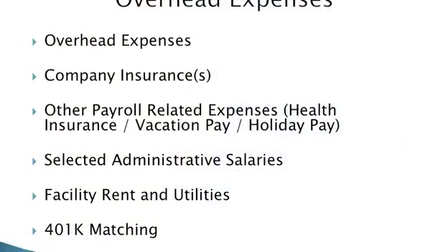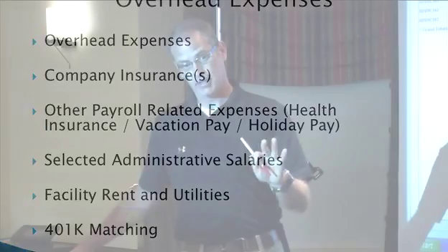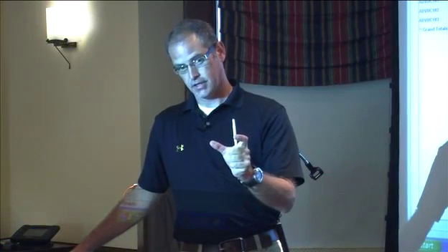And that's just it, that X factor, right? That $180,000 job that you've got all labor in, that's the one you've got to keep your eyes on, because now you're performing to this. There's a little blurb in the article from Mike there, and he goes over that as well, that the overhead as a portion of labor is one of those that most accounting systems can handle pretty well. We do it automatically through payroll, so you can tag a job or you can tag the entire company and say there's 38% overhead on top of this.